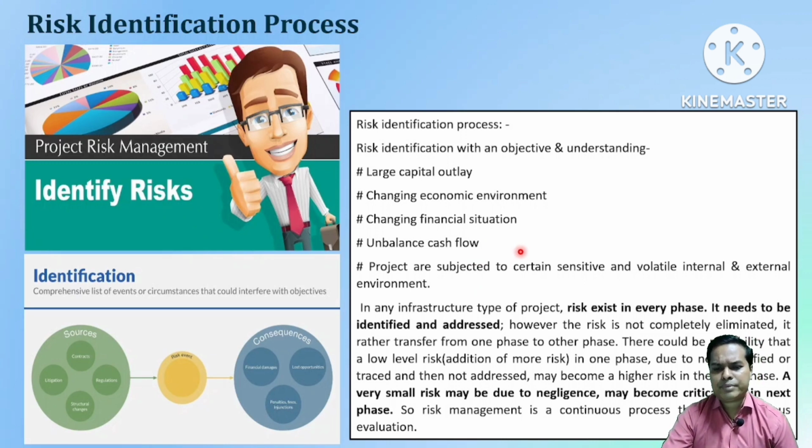That is why I mentioned here, if your cash outflow is more than the cash inflow, then where will you get money from? Your project will get delayed, vendors' and labor's payments will not be on time, and then consequences like labor strikes and many unwanted things will happen, beyond your control. Ultimately the project will get delayed, the project will be in loss, and finally your brand value and image will also be burned. So in any kind of infrastructure project, risk exists in every phase. It needs to be identified and addressed.